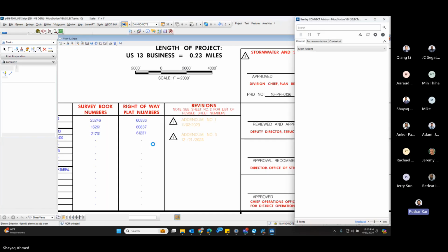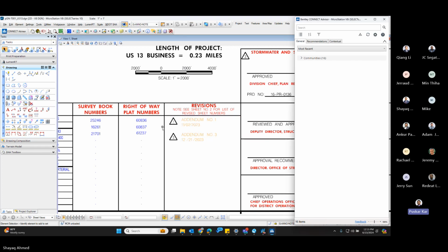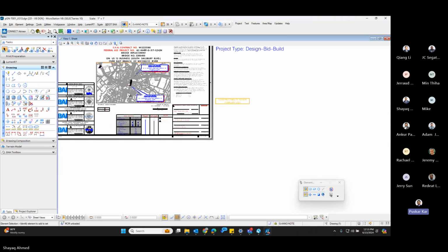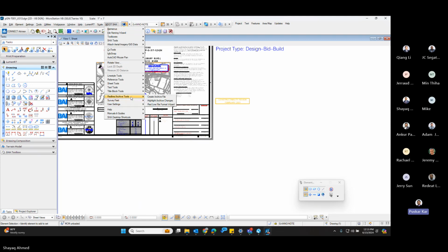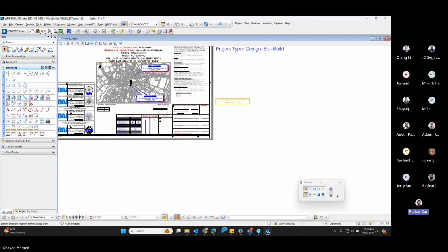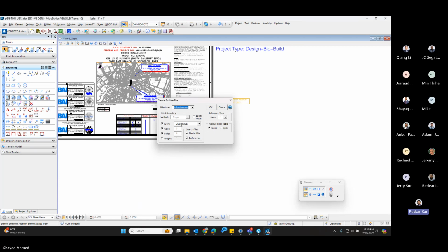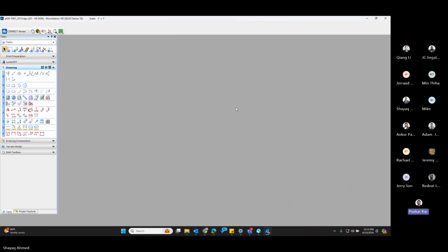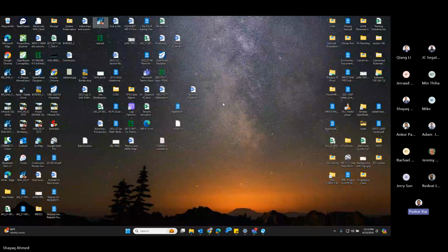The reason for archiving is so that you do not inadvertently change anything that was part of the original contract documents. That cannot be changed. That has to be there so that it is part of the document. And anything that you're overwriting or changing or revising would need to show and identify what has been changed. Any question on that?